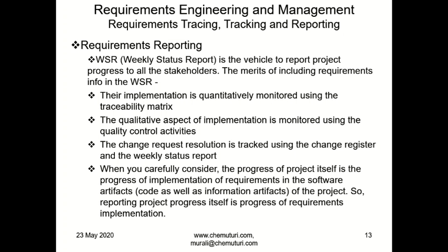The most important part of a weekly status report or any status report is the project progress, and the progress is implementation of the requirements. And the transformation of requirements into high-level design, low-level design, backlogs, test cases, whatever, and ultimately into the code artifacts, test cases, and test logs. So reporting project progress itself is progress of requirements implementation in the product.